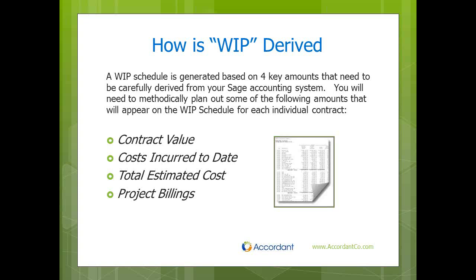value. The next is your cost incurred to date. So what represents costs? Costs are your accounts payable invoices and your labor costs, not just your hourly rates, but all the burden that's related to that labor cost also. One thing to point out is that it's not your purchase order or your commitment that's included in this cost incurred to date. It's the actual invoices that you receive from your vendors.